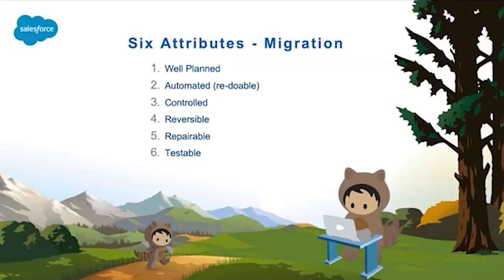Let's assume account, contact, and opportunity are in scope for migration; they will create a summary report of how many accounts, contacts, and opportunities, and provide a summary of source versus destination comparison. At a high level, it may look appealing, but it is not generally recommended. Your testable end product will be a detailed report rather than a summary report, because every row and every field within that row matters when it comes to data migration.